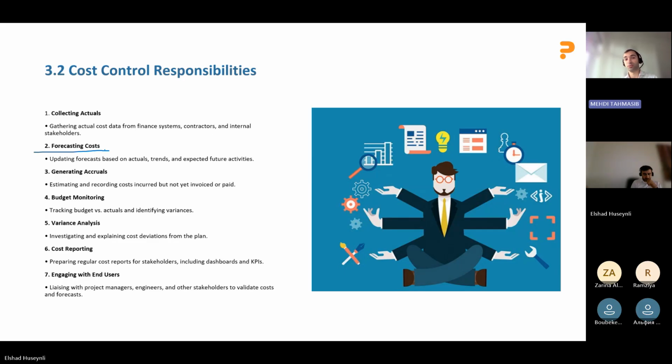It's not just putting in a number. We generate a document where the end user and we sign that number as an accrual, and we show this when the audit comes to check what the basis for that accrual was.